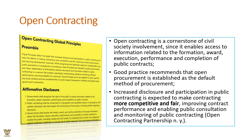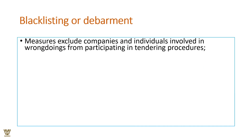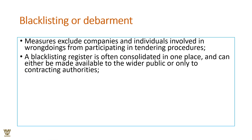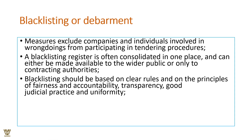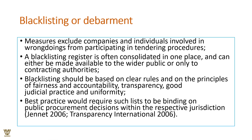Blacklisting or debarment measures exclude companies and individuals involved in wrongdoing from participating in tendering procedures. Blacklisted entities are not entertained because they have behaved in a shabby or shady manner in previous contracts, losing their credibility. Blacklisting can be for life or for a fixed period. Blacklisting registers are consolidated in one place and made available to the public. Blacklisting must be based on clear rules, principles of fairness, accountability, transparency, and judicial practice, and should be binding across the respective jurisdiction.